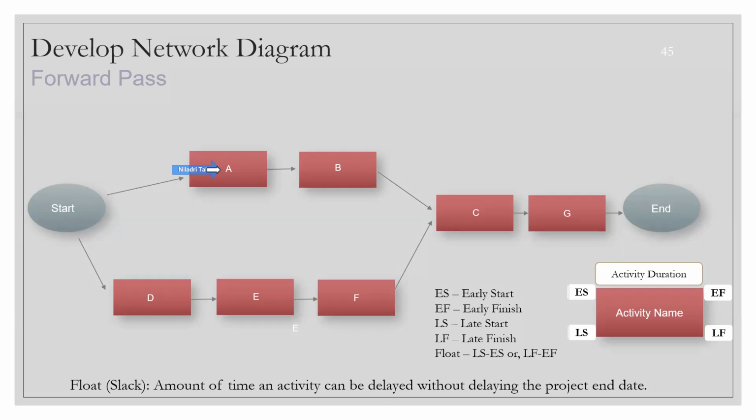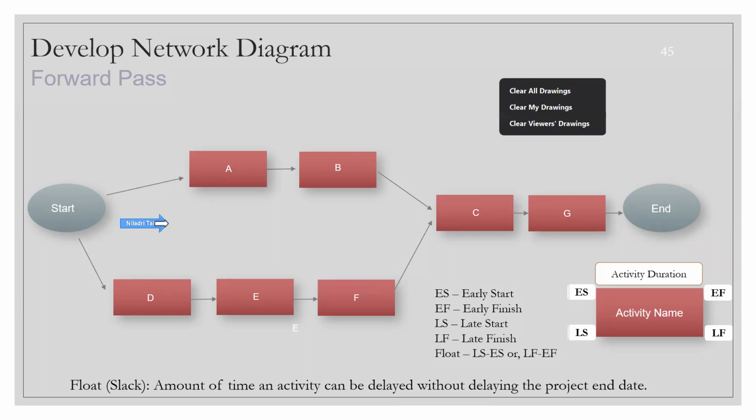But there are certain items, if you look back into that chart again, like let's say D and then E and then F, all these things can be done in parallel. They do not have dependencies with A and B. Similarly, you will also see that your C and G have a dependency on B and F as well. Let me go back to that. Let's see how it looks, and probably you will remember that.